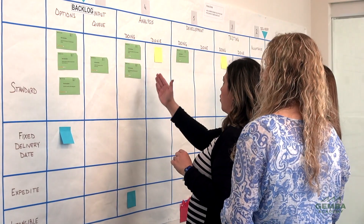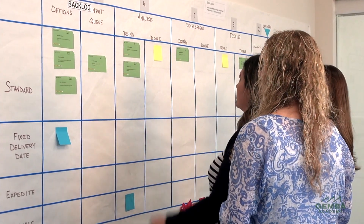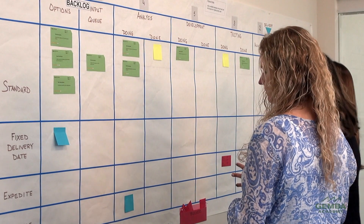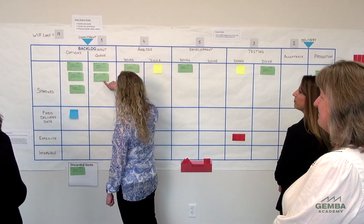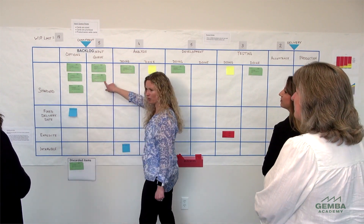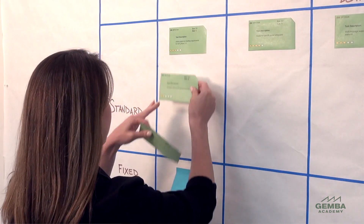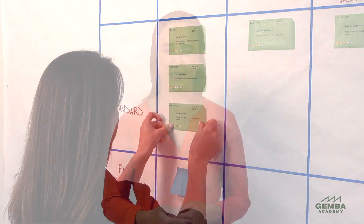Once the project has been broken down into tasks with estimated times, teams can use the Kanban board to plan and prioritize future activities and tasks. The left side of the Kanban board represents the future, or work not yet started. Teams do Kanban planning on the board by positioning items when we think they are most likely to be delivered. The Kanban cards can be reordered within the far left column as their priorities, expected delivery date, or expedite status changes.